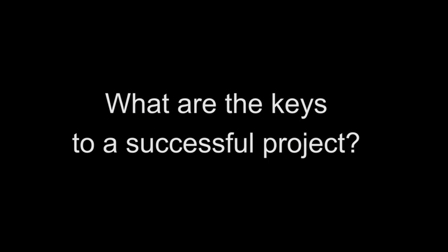We want to, from our perspective and working with these types of communities, minimize that as much as possible. The key to a successful project is the planning. And really that comes down to, at the very beginning, the capital reserve study and the funding for that. So what we look at and we recommend is that even before you are thinking about doing any type of project, you want to make sure that your funding is there. That will eliminate any concerns or issues for having an assessment down the road that would be an unforeseen expense for the membership. Having a healthy reserve fund will mean that when a project comes up and when it's due for replacement, when you have to replace your siding, roofing, etc., you'll have the funding there, and it's going to make it a lot easier to begin that process.